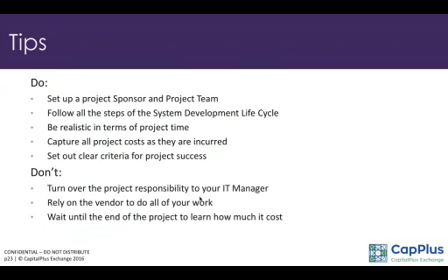Things that you should never do: don't give the IT manager the project responsibility, purely because he's there to provide you with a supporting role. He may not have the skills to do project management. If he does, he has to do it full time. He can't do his IT manager job and be the project manager also. Don't rely on the vendor to do all your work. Never do that. Also, don't wait till the end of the project to learn how much it cost. You need to know how much it costs every step of the way. Monthly project budget reporting to the steering committee is a must.